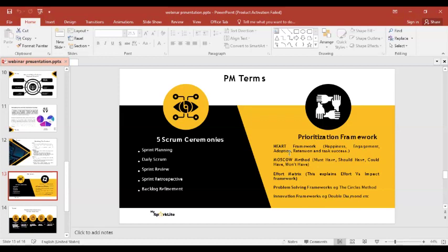And I said daily scrum is like a daily stand-up meeting you do on a daily basis to evaluate the tasks that have been given to you and how well you completed those tasks. You understand? Sprints are usually done between 2 to 6 weeks. You understand? But that is the normal, standard, conventional one. But some people go as much as 12 weeks, 8 weeks, depending on what the feature is and what they have to build. That will determine how long it will take.